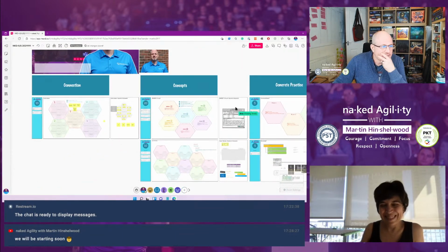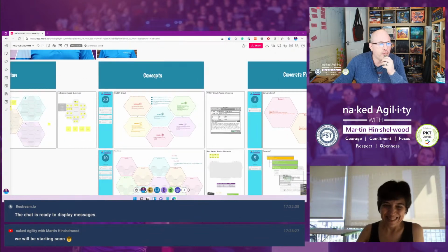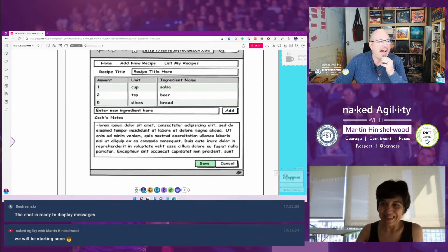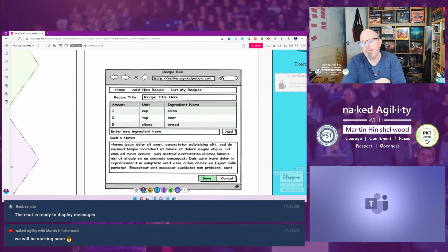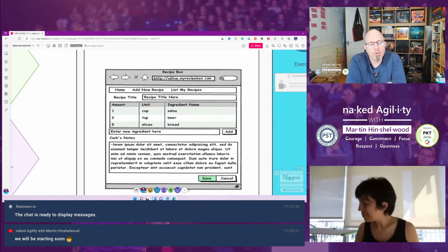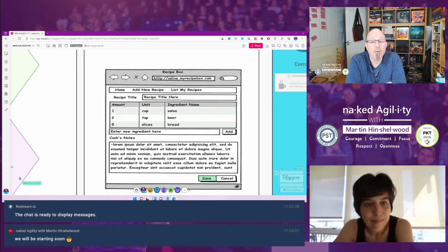So one of the things that I think is really important in user stories, and definitely an important caveat when we talk about user stories, is that user stories were developed, and it's a slightly weird way to say it, by telling stories about how users interact with your system. If users are not interacting with your system, user stories are probably not the best solution to your problem.